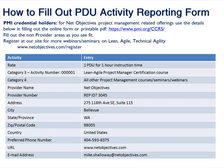How does this work for a software package run locally for 300-plus locations nationwide that requires at least two months of testing prior to release? Say you need to do that — look at how you're doing it and try to shorten times. The more you can shorten time between steps, the faster it will be. However you're doing it now, set up the value stream, look to see how things are being handed from one step to another. Where are you introducing delays that aren't really giving you any benefit? They typically cause pain. This works by creating visibility into the delays that are taking place.